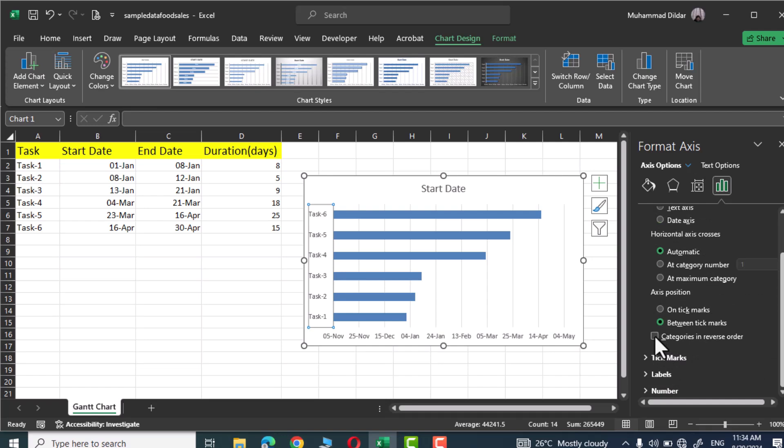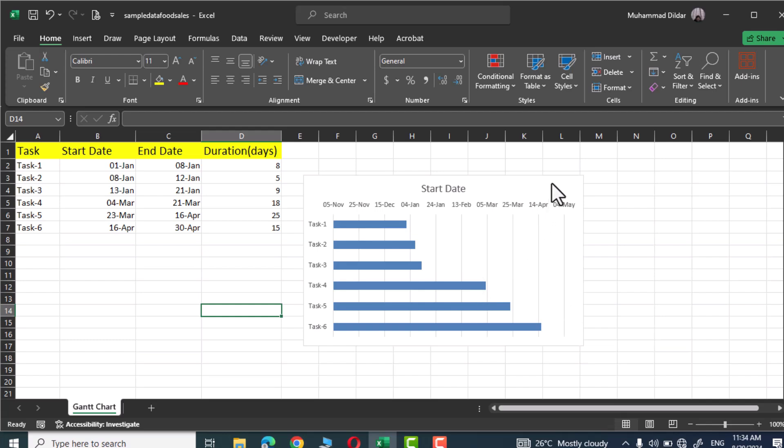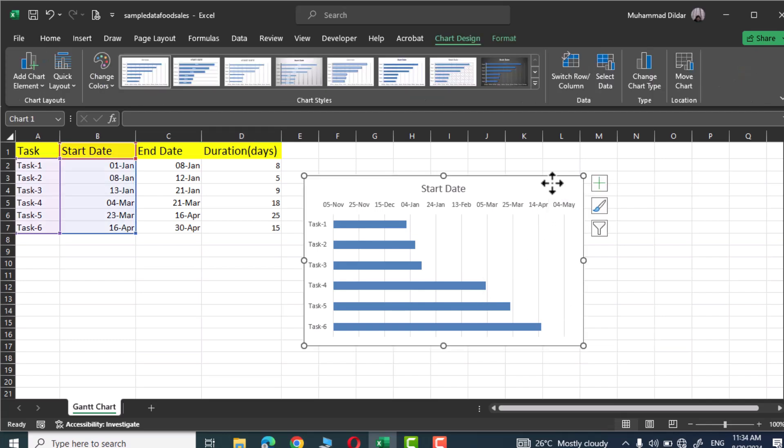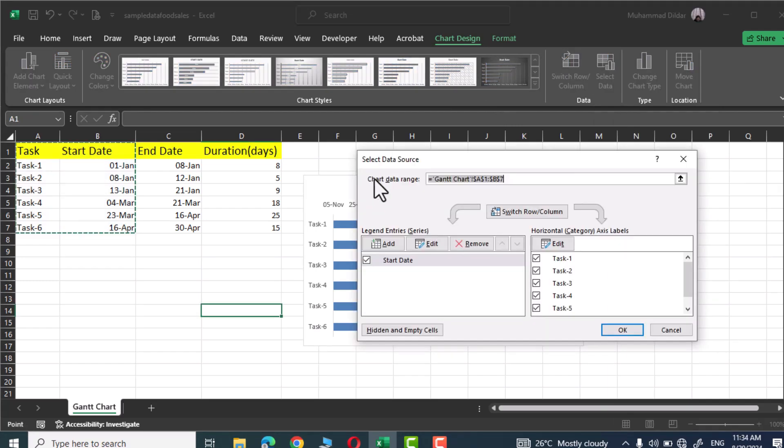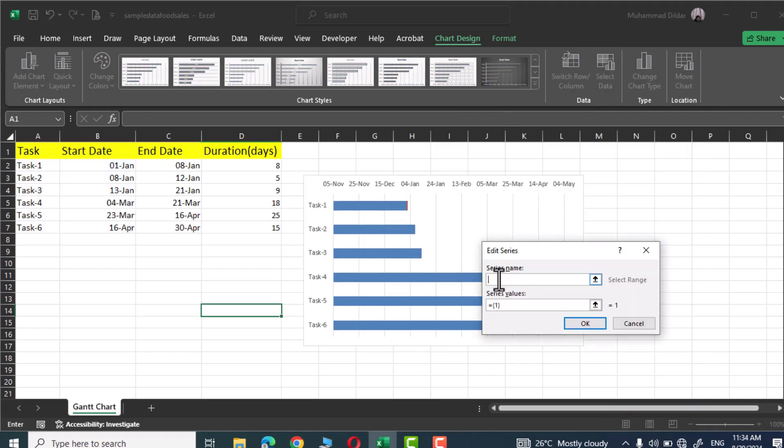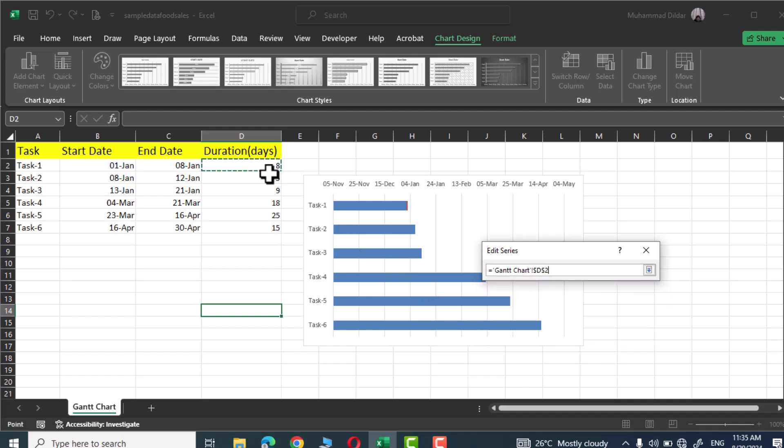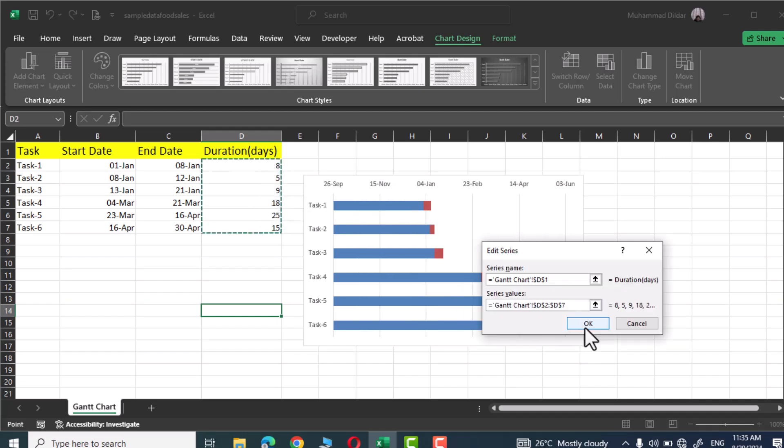Next click on your chart, go to chart design, and here you have this option select data. In the select source data go over here and click on add. Here we need to enter the series name and the series name that we are interested in is duration. Now in the series value delete whatever value you see over there and now select these days durations. Now simply click on OK, again OK and there we have our chart almost ready.